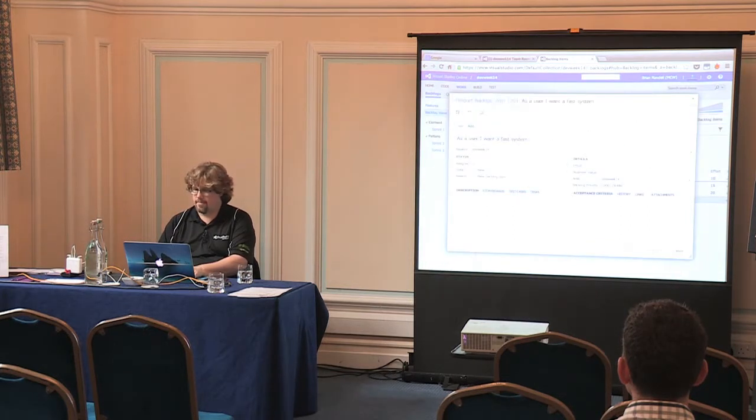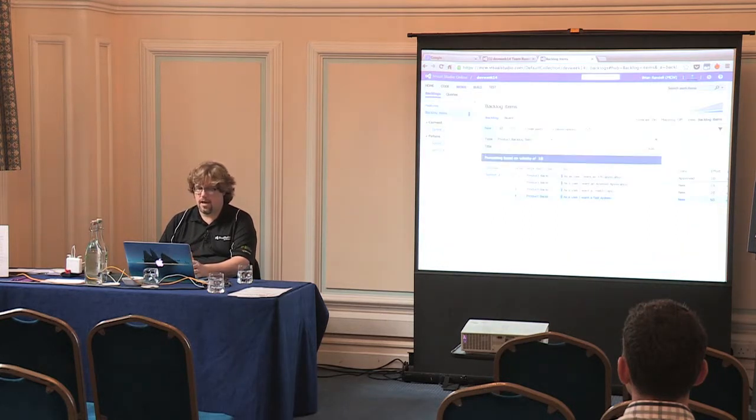And we'll say the fast system is something really large, like 50, that maybe needs to be broken down. So what you see here is that the forecast line is right there. If I go over here to my velocity and say, well, we can get up to, say, 30 story points done, now we see the work we get done in sprint 2, sprint 3, et cetera.